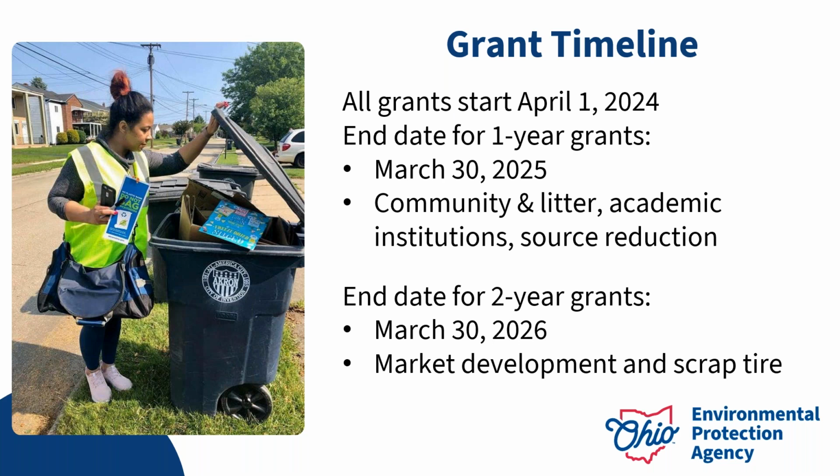If you were awarded a community litter grant, academic institution, or resource reduction, which is the water bottle refilling station grant, you have 1 year to complete your project. These projects have a start date of April 1st, 2024, and run through March 30th of 2025. If you were awarded a market development grant or scrap tire grant, these grants generally require a government sponsor. You have a 2-year grant timeline, and like the previous category, have a start date of April 1st, 2024. But unlike the previous category, run through March 30th, 2026.